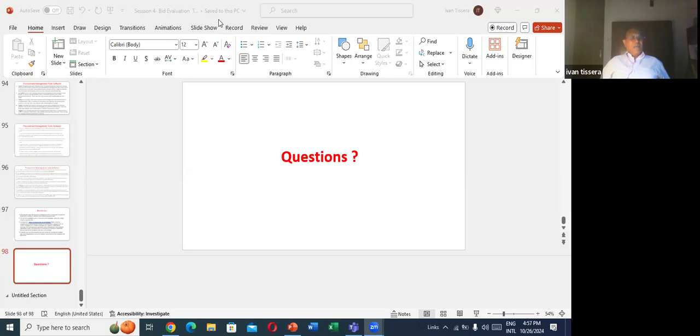We send a letter: Mr. Contractor, you have been selected for this contract. Please come and sign the contract agreement. That is called the letter of award. If he cannot come within that period, he will be punished. His security will be forfeited, and we go for the next lowest and send the same letter. The time we give is only 14 days.